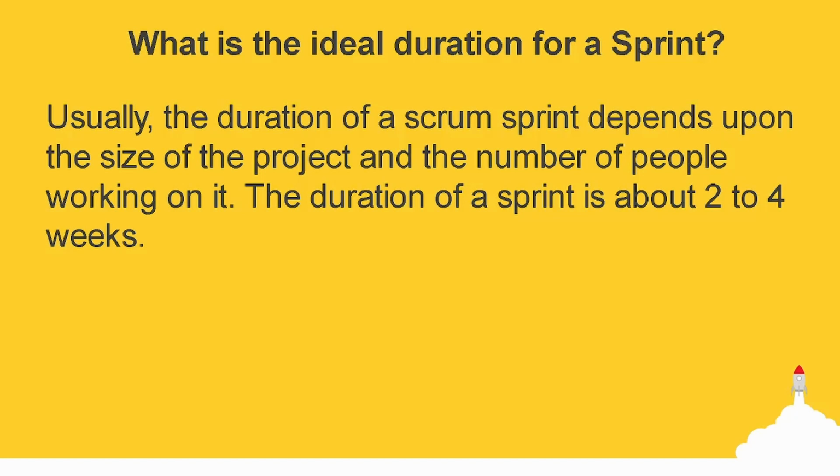The shorter the duration of the sprint, the more the risk is reduced accordingly. This is very important for the product owner. At the same time, if you keep the sprint too short, you will end up spending more time in Scrum events and meetings.